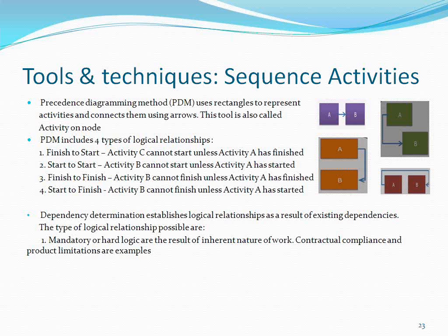So your manager will ask, have you tested the software? No, they have not designed at all. If they start design, I will start my work. If they don't start, how can I start? So activity B called testing cannot be started unless activity A has started, that is designing. So you can't start testing till the design has started. If they finish 2% of the design, you will finish 2% of the testing. That is start to start.